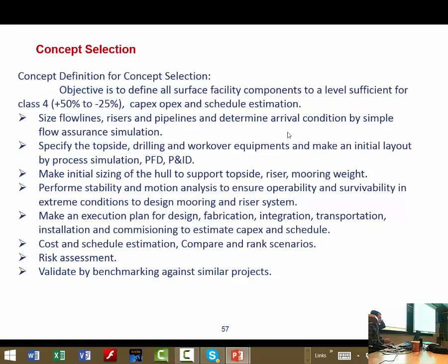I think for topside, for hydrodynamic part and marine analysis part, I think 3 person. For machinery, 2 person. Topside, roughly 5-6 person. I think altogether we are a team of 15 to 20 people. And 6 months, 3 months for that phase. Around 3 to, depends on how.